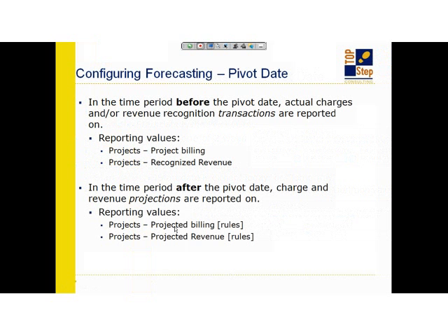That's where OpenAir, when it runs its forecast, figures out the forecast value and populates it in these projected fields. The actual values that you have probably already been using quite a bit are just project or recognized or actual or something like that. So that's basically the difference: almost all fields that have the word projected actually come from OpenAir's forecasting calculation.